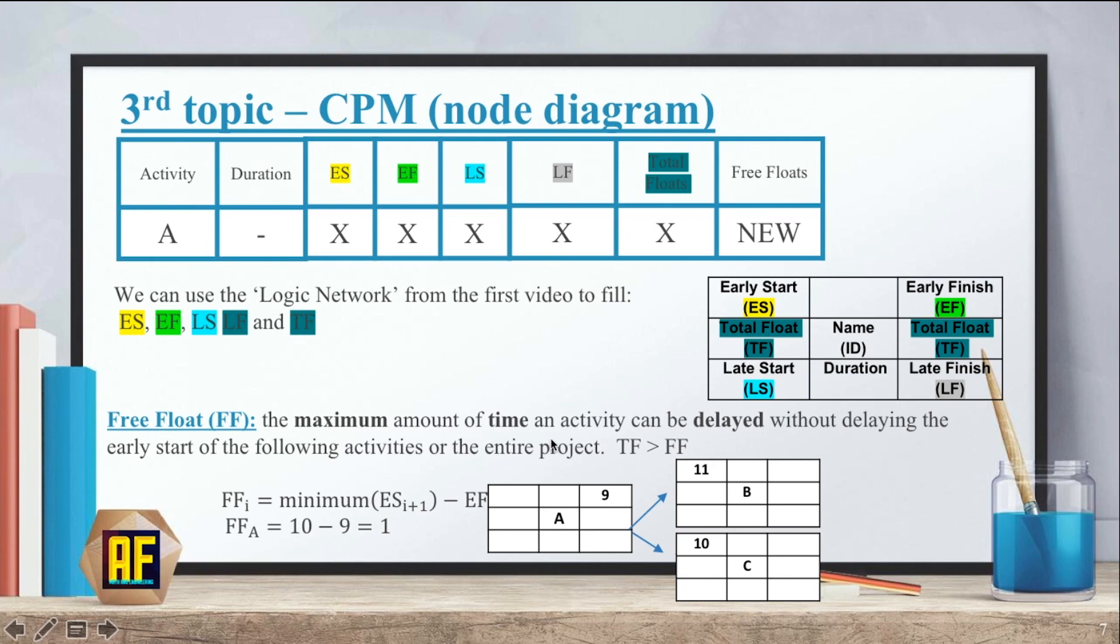The free floats is the maximum amount of time an activity can be delayed without delaying the early start of the following activities or the entire project. Your total floats should be bigger than your free floats. So our equation was free floats for an activity equals the minimum early start of the next activity minus the early finish of the activity discussed. So for example, if I have A, B and C, and I want to calculate the free floats for A, I'm saying the minimum ES plus one, the minimum of ESB and ESC - we have 11 and 10, so the minimum means the smaller of the two, which is 10, minus the EF of A, which is nine, gives us one.